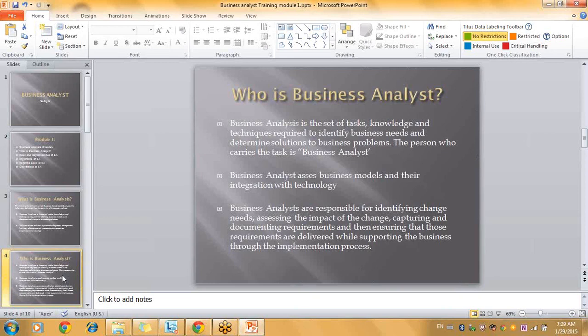if I'm changing the particular format, how will the user take it, right? People will not know if you're changing the format of a username suddenly. You should see how many users want that. You should ask the business why they have come up with the change request. If your application, for example, is globally used, for which region should we change it? Is it region specific or global? Because you never know what the user expectations are. They are used to that. You should ask this question before you do a change, right?